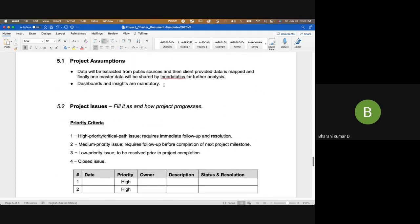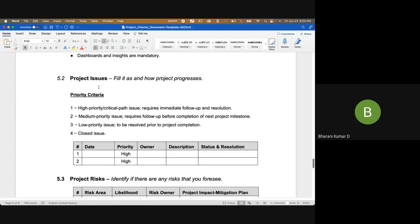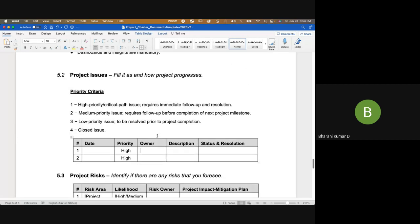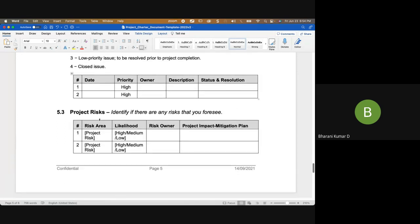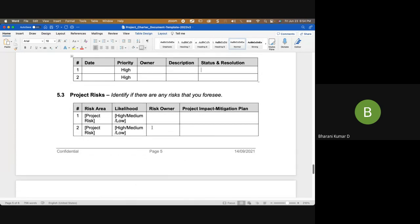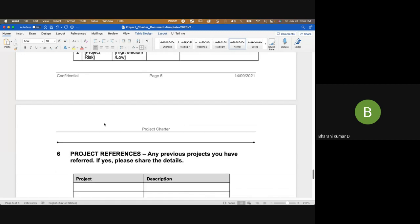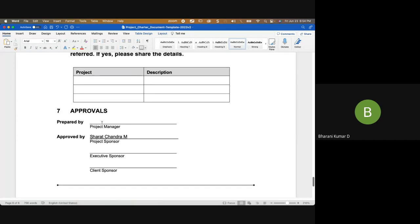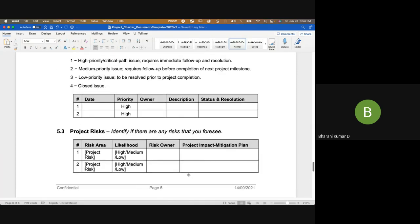Dashboards and insights are mandatory. As you progress on the project, you mention any project issues that come up — who is the owner, who will resolve it, and whether it's open or closed, with the resolution provided. You also have a project risks section where you identify risks at the beginning and continue to identify more on an ongoing basis. The project charter is a living document. If there are any previous projects, mention those references and descriptions. It is usually prepared by the project sponsor but the project manager may create it and the sponsor approves.